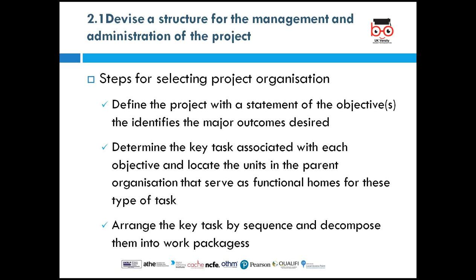And then the next step is for you to determine the key task associated with each objective and locate the unit in the parent organization that serves as a functional home for this type of task. Let me explain that again. You determine key tasks associated with each objective.